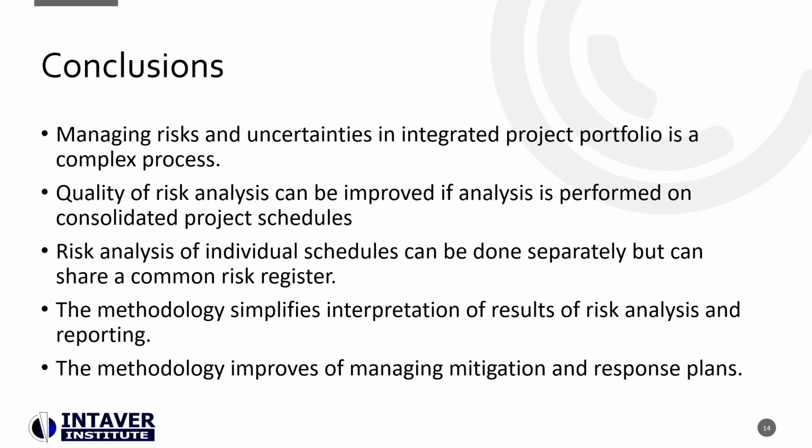Risk analysis of individual schedules can be done separately but can share a common risk register. This not only simplifies the analysis of the master project schedule, but also allows for a consistent analysis of individual schedules asynchronously. It means that different departments and different managers can perform analysis of their own project schedule, but it will then be reflected in a master schedule automatically.